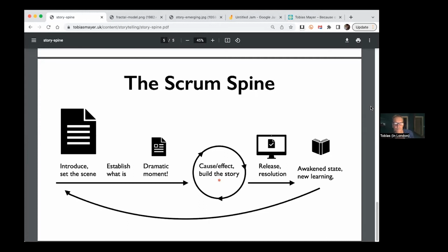Right. So now, going into cause and effect: what needs to be true for everybody to enjoy the beer o'clock every Friday, not just on the Friday when they were ending sprints? It was two-week sprints, so you could enjoy one week, but the other one was, let's get it done. From a release and resolution, what they started thinking about in a retrospective is how to sequence the work. Pick the smaller work at the beginning of the sprint so everybody can focus on that, then have bigger chunks of work in the middle of the sprint. At the end of the sprint, it was all hands on, whoever needs to test or do whatever to get things done, so we have finished items and meet our sprint goal.